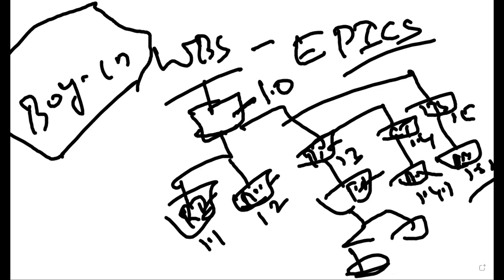So you are able to identify each and every WBS component within the same hierarchical structure by providing the numbers. So this kind of numbering system, giving the number or identification to each and every WBS component, please note, is called the code of accounts.